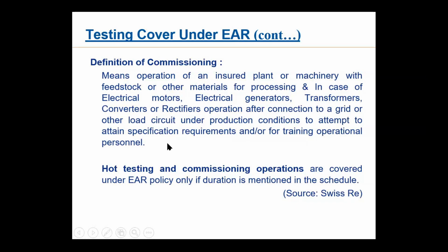So hot testing and commissioning operations are covered under the EAR policy only if the duration is mentioned in the schedule. Please understand, this is very, very important. Your policy period should be sufficient. It should not happen that your testing period is continuing, but your basic policy period has expired. Then your testing will also not be covered. So first you extend the policy.